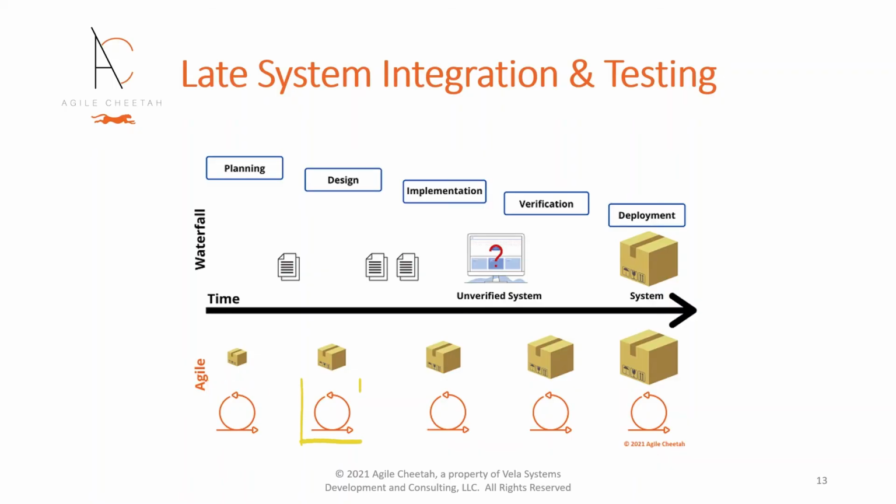Agile planning is adaptive with short project planning horizons. Software development teams achieve fast and frequent releases by keeping releases small. Planning and releasing this way allows for more opportunities to test and validate deliveries and to fold lessons learned into ongoing planning. Best of all, the measure of project progress is delivery of valuable capability to customers and end users rather than arbitrary estimates of completion rates.